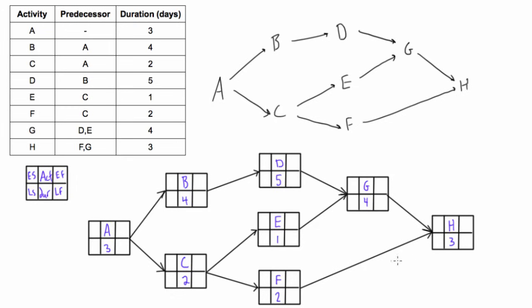Now we want to complete our forward pass to find the early start and early finish, and then once we have that we'll do our backward pass to find the late finishes and late starts. Starting with activity A — we start at zero. Activity A's duration is three days, so zero plus three gives early finish of three. We bring that three forward as the early start of B and C, since they can't start until A is done. Three plus four is seven, and three plus two is five.